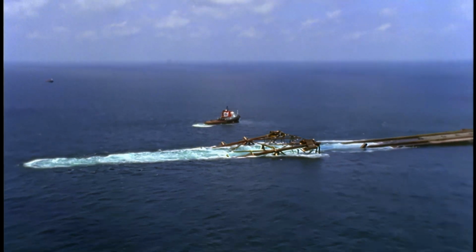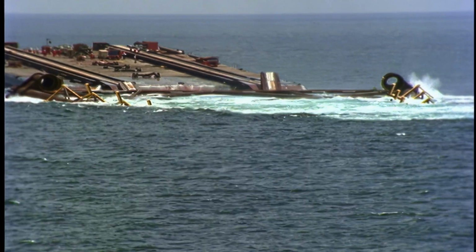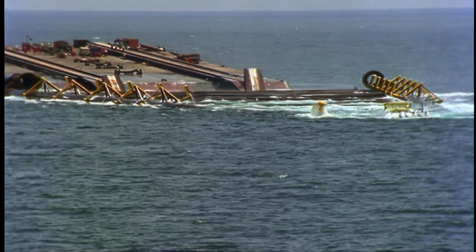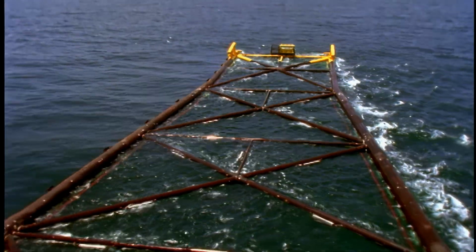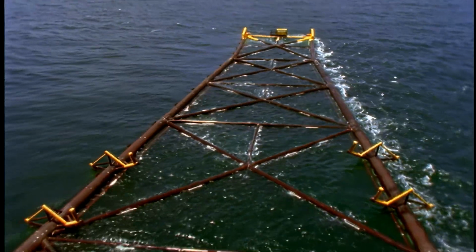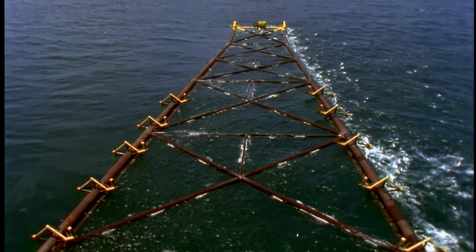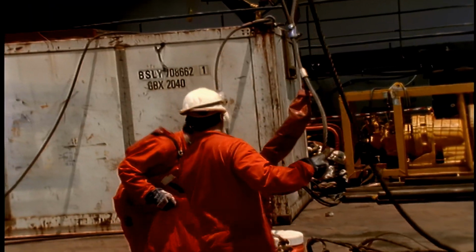Lessons of previous projects have been well learned. Thanks to extensive pre-testing of the jacket's flooding system by Shell's fabrication site team and AGM, the structure floats as it should. Now, installers will bring the jacket upright with controlled flooding, and work will continue as planned.